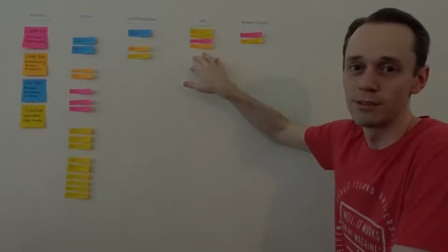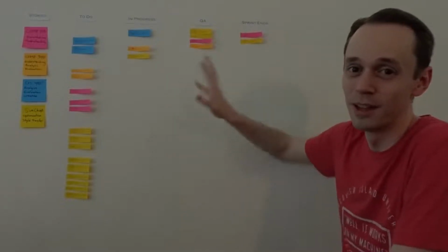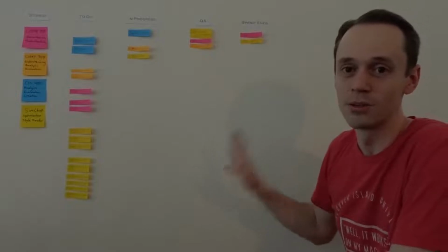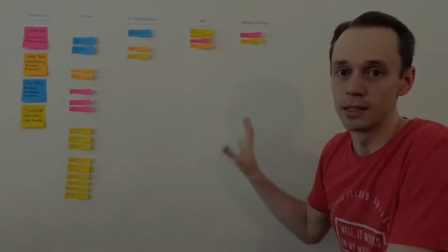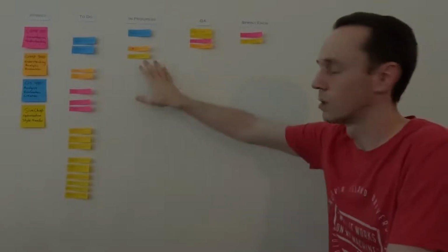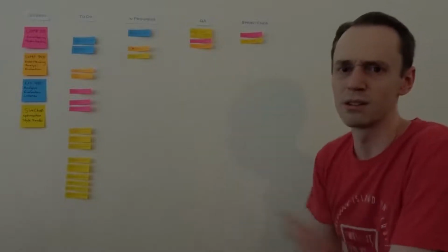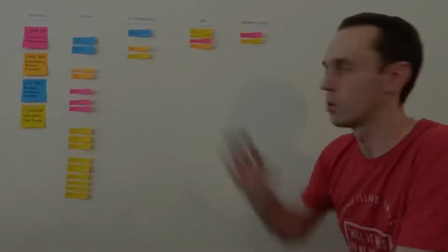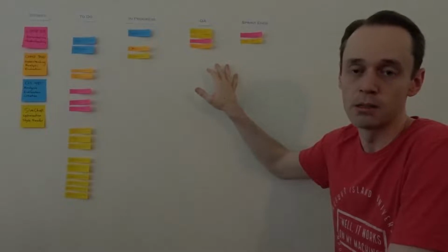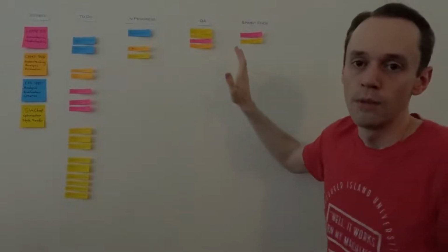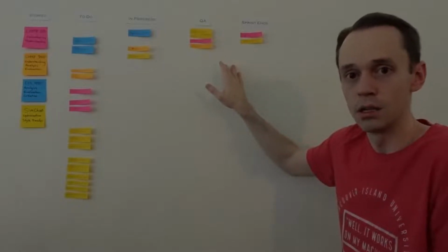So I'm discovering that debugging for software development really does take quite a long time, and you have to make sure that you're giving yourself, as part of managing your time, realizing that it's going to take maybe twice the amount of time it took you to actually write the code to then fix any of the issues with it. Because it's not just the errors in the statements of the code, it's also the logical thinking behind it. Maybe the mathematics calculations that you're doing, you might need to go back and scrutinize to make sure that what you're trying to calculate is actually what you need.